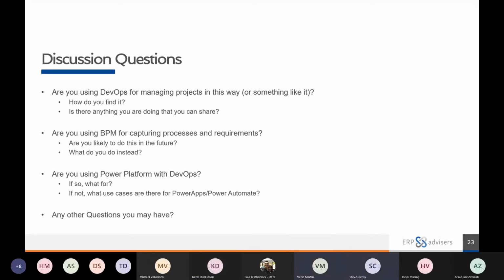I think DevOps is more made as a collaboration tool. So, you know, you can't do a baseline of this is the scope for the project, because everyone can go in and edit everything. I think that's one of the shortcomings here, is that you have to rely on each other. Everyone can adjust or edit everything. Obviously, you have an audit trail, but you can't keep a baseline. You can't just do a baseline and say this is the scope that we are working from. That's true. Yeah.